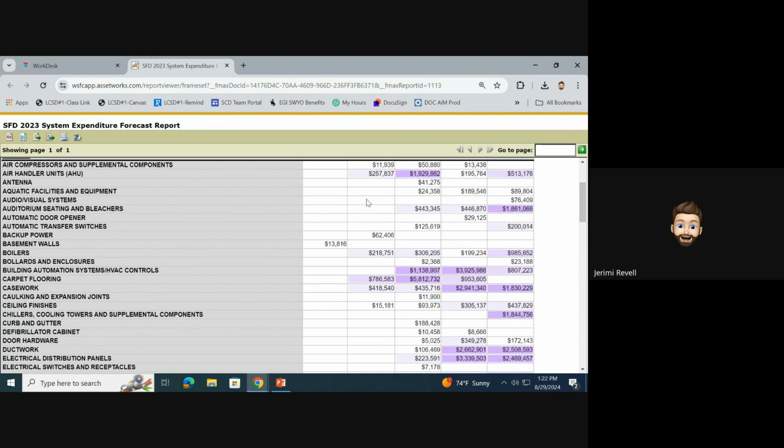Now, if you've got a VAV replacement project, the dollar value that you're going to see here is only for the replacement of those VAVs. We all know that a lot of the times the ceiling grid is probably old and dated, and it's economical to replace that ceiling grid at that point in time because removal and reinstallation of the existing ceiling grid is almost the cost of new.